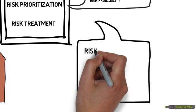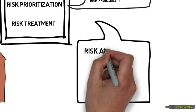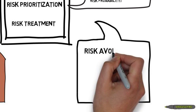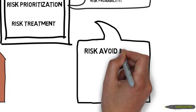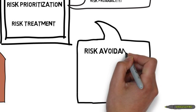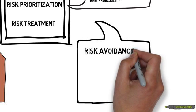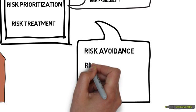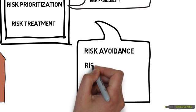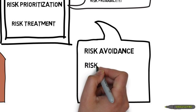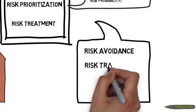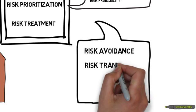The first risk treatment is risk avoidance. For example, if there is a risk related to a new component, it is possible to postpone this development to a new release. This is a slightly uncommon risk treatment.